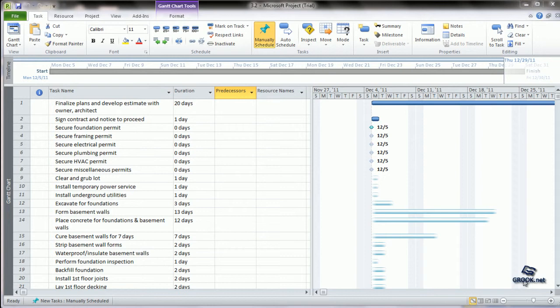A milestone is a reference point in the project based on which project progress can be monitored. MS Project shows milestones as tasks with zero duration.